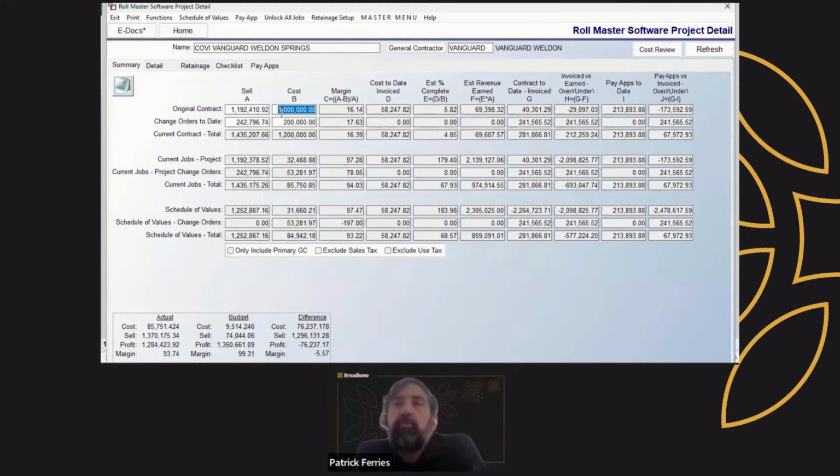Also, when we get into revenue recognition and some of these calculations we're going to talk about, we needed good starting numbers, even though maybe we haven't even set up all our projects yet. We landed that project and we haven't had time to dial in and set up all 50 jobs or whatever else of the project I want to get in the system, but I need to get off and running. So I needed to get that original forecast of sell and cost in there.